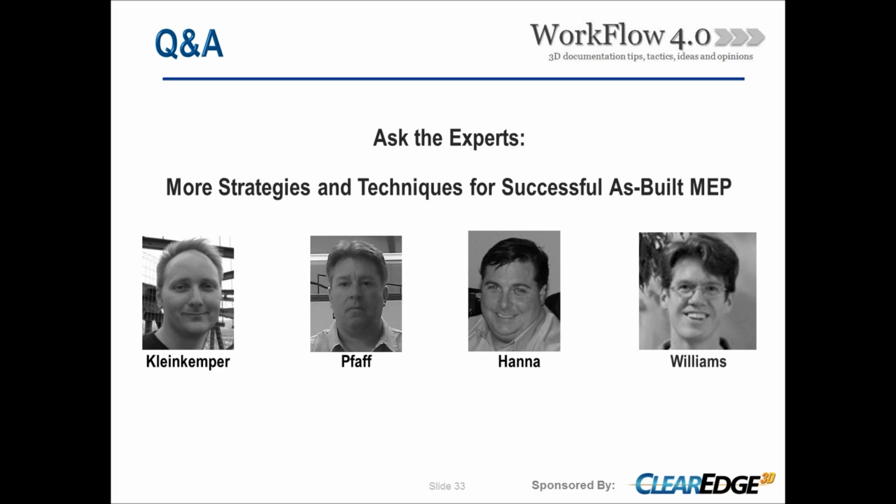But overall, we're probably getting about 20 to 40 scans with a particular scanner per day. But that's a 12-hour, 14-hour day also. Yeah, if I could just expand on that, I think Mike is spot on there. There are so many different factors that play into it.